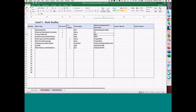If you look at the things on the spreadsheet — and it's high level, but if you're doing your particular project, use a spreadsheet like this for the area of the plant you're working on. So if you have to replace, say, an agitator on a vessel, somebody's got to look at all the operational data — how far back are you going to go? Somebody's responsible for it. You look at historical operating parameters, process materials, all these things.